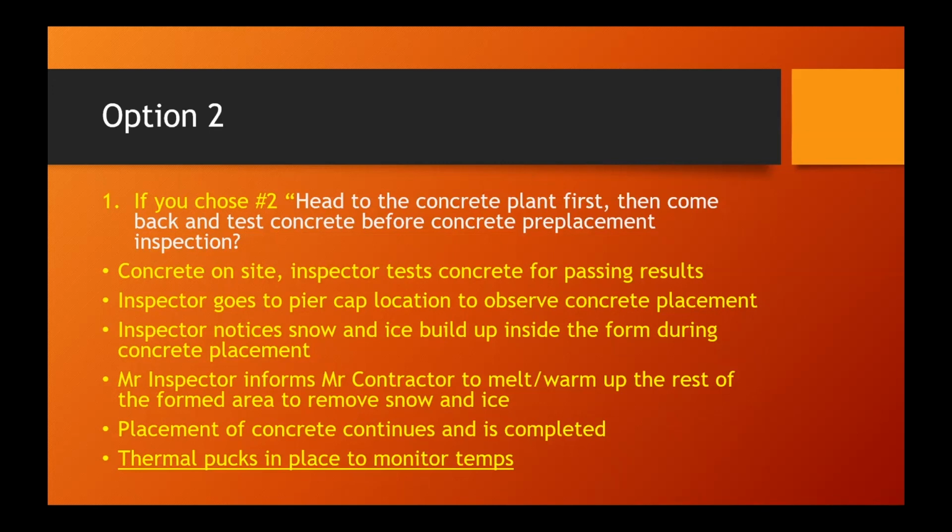After the inspector tests the concrete, he goes up to the Pier Cap location to observe concrete placement. By now, there's already 1 truck, if not 2 truckloads into the Pier Cap. The inspector notices there's snow and ice buildup inside the form when he arrives. So Mr. Inspector informs Mr. Contractor to stop pouring concrete, needs to melt and warm up the rest of the form area to remove the snow and ice. So after all that's done, placement of concrete continues and is completed.